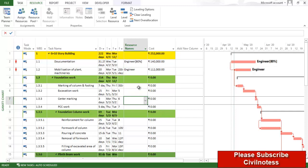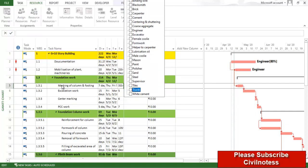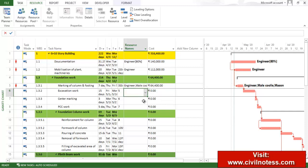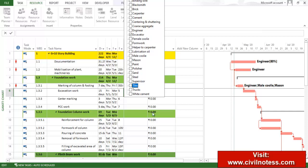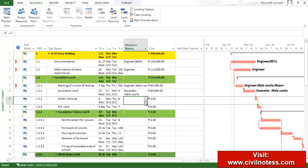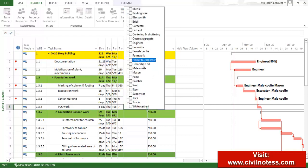For marking of column, we require the engineer, one mason, and one male coolie — these three people. For excavation work, we require the excavator and the male coolie. For center marking, we require the engineer and one male coolie. For PCC work, we require the mason and male coolie.